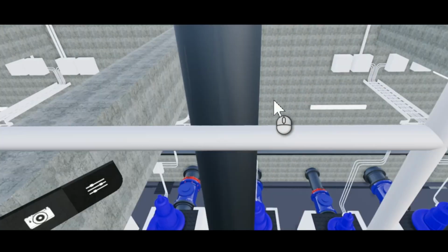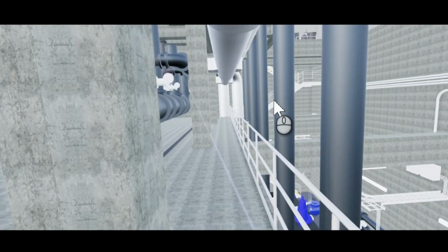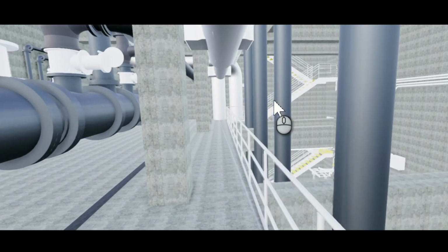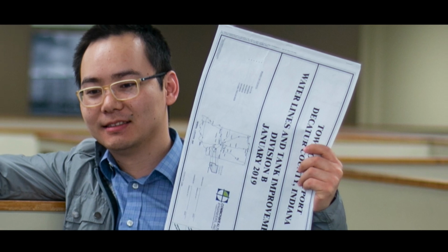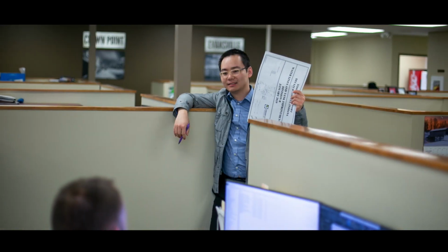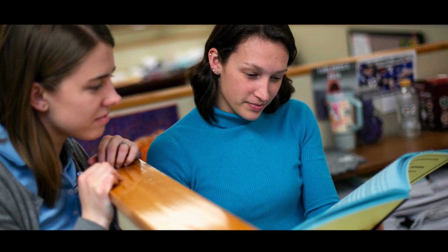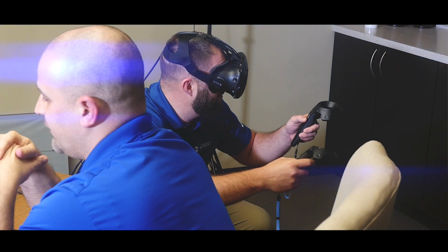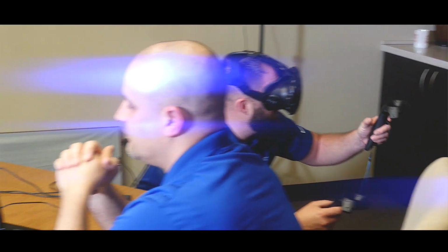I've actually taken the virtual reality tours of some of our pump stations, and you look at it and say, that valve's a little too high. I'm 6'3", and it would be a stretch for me to try to actuate that valve. That's not something that's readily seen on paper. So many people have struggled to view things in 2D. You could work with them for months or years, and then they throw on this headset and say, oh yeah, this is what it's going to look like. You can see issues in an area that you weren't expecting.